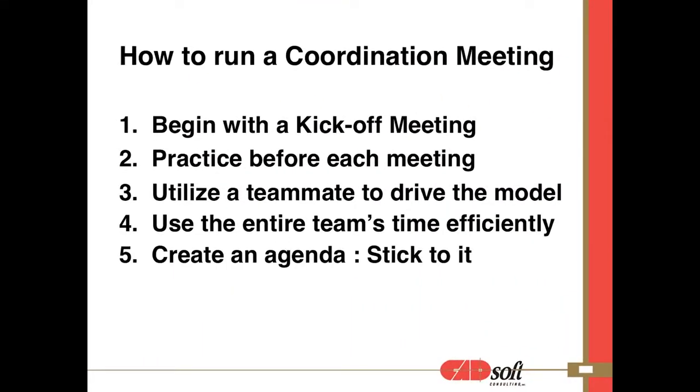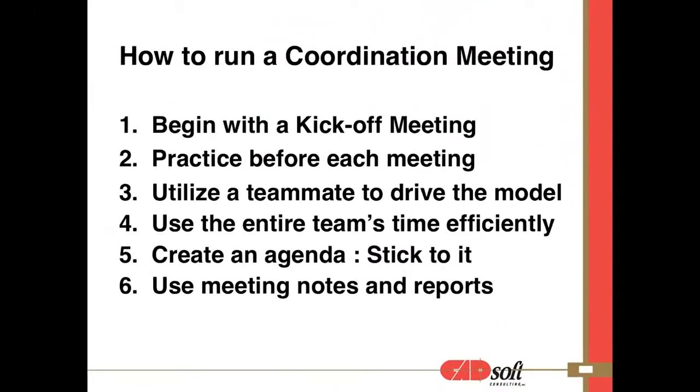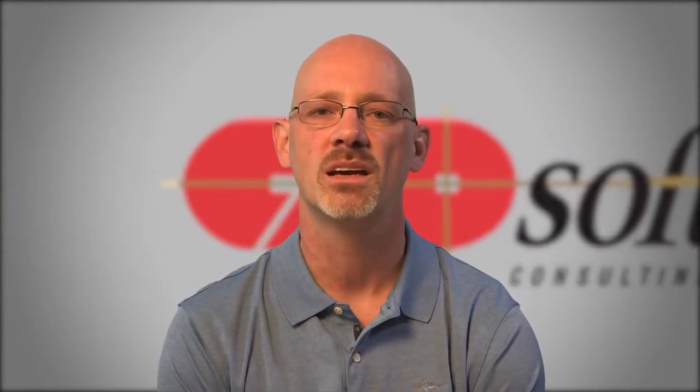Creating an agenda can be very easy to start with, but sticking to it can be difficult, I've found myself. So if you can develop a practice of utilizing an agenda, it can be very useful. One thing that's helpful in doing so is creating the meeting notes from markups that are generated during previous sessions. Also, one of the advantages of Navisworks Manage is that from the collision detection tool, I can actually make an external report that can be shared, but I can use that as an agenda item. That way we're going back and reviewing all the items from the previous meetings, and as the review continues, we find better efficiency in how we deliver that.